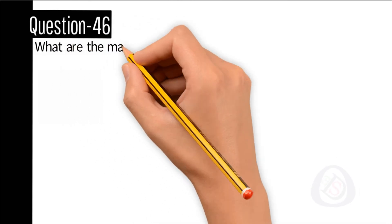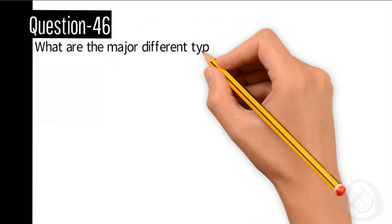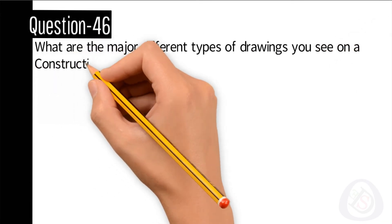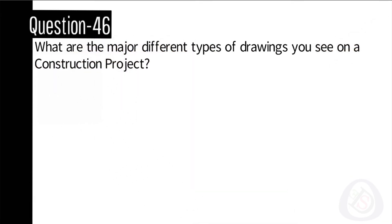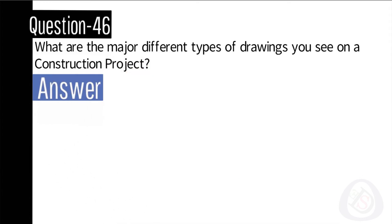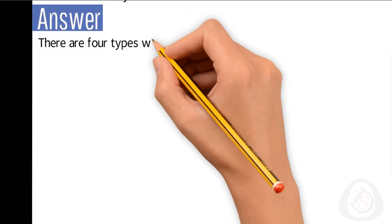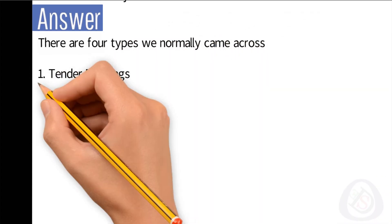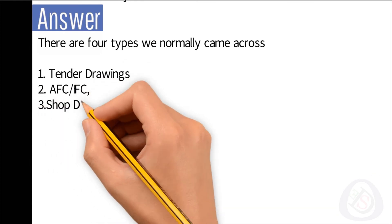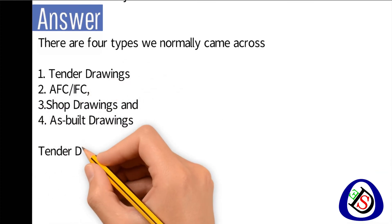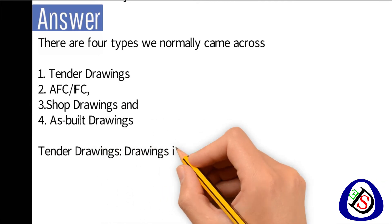Question number 46: What are the major different types of drawings you see on construction projects? There are four types we normally come across: one, tender drawings; two, AFC or IFC; three, shop drawings; and four, as-built drawings. Tender drawings are drawings included in the tender documents, released by the client for pre-qualified contractors.